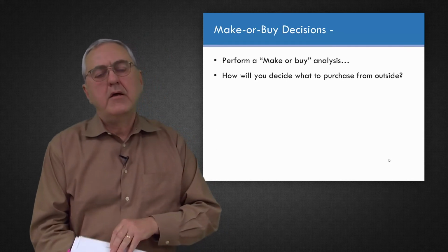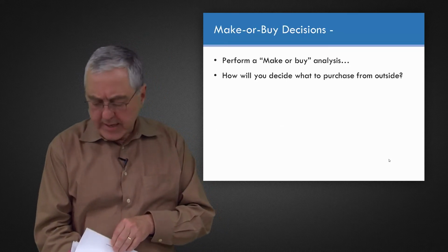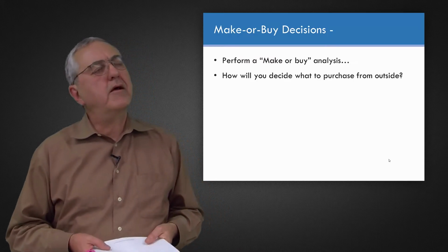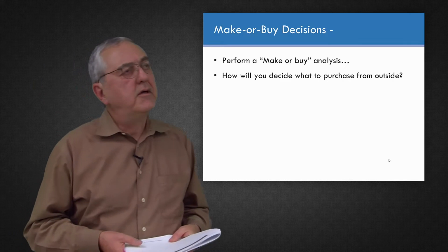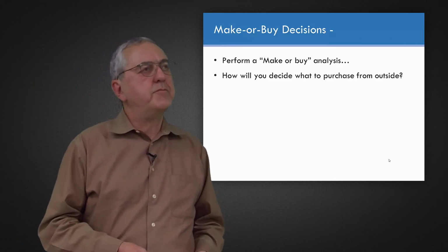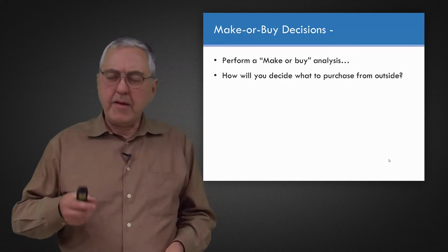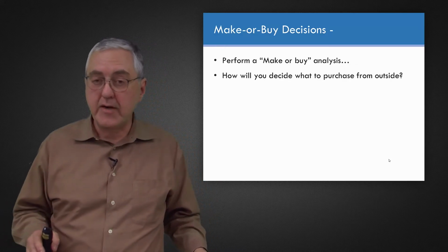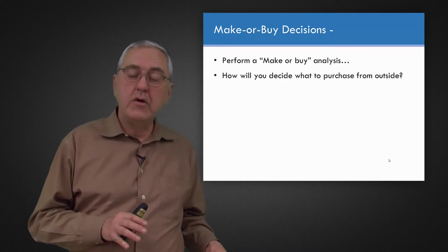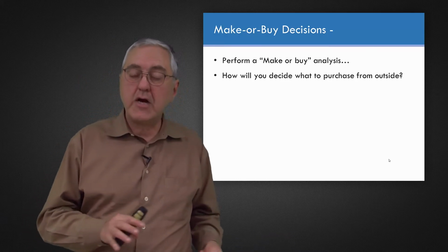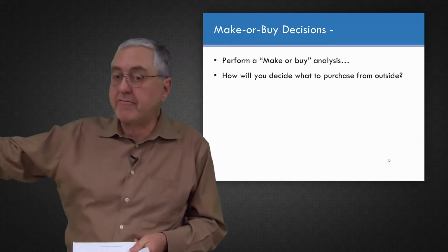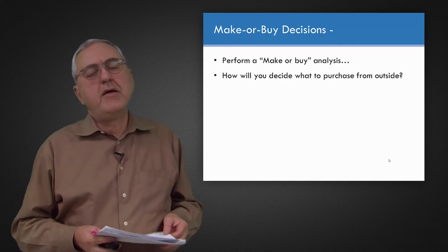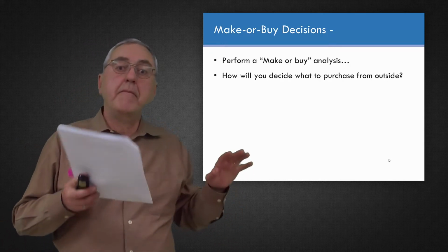And during procurement planning, you're going to do make or buy decisions. For example, let's use the example that you're going to renovate the floor of the office building. Clearly you are going to buy the services of the renovation contractor. Your company does not do renovation or construction, so you're not going to do it with your own people. You're going to buy it from the marketplace. But what about design? Maybe in the make or buy decision, maybe you make.